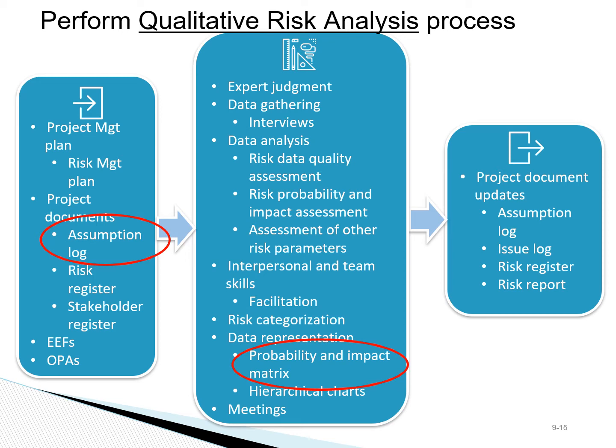After we have identified the risks, we can carry out qualitative or quantitative analysis. In performing qualitative risk analysis, we need to assess the impact of each risk if it occurs, and also estimate the probability of risk occurrence.